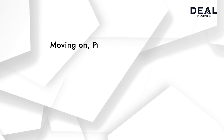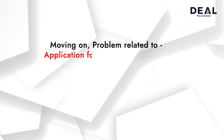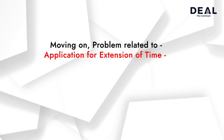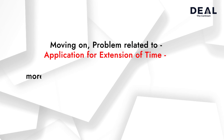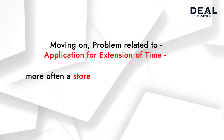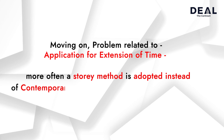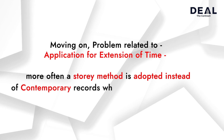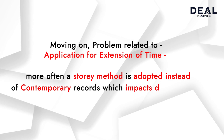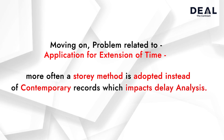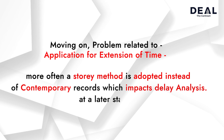Moving on to the problem related to the application for extension of time: more often a story method is adopted instead of contemporary records, which impacts delay analysis at a later stage.